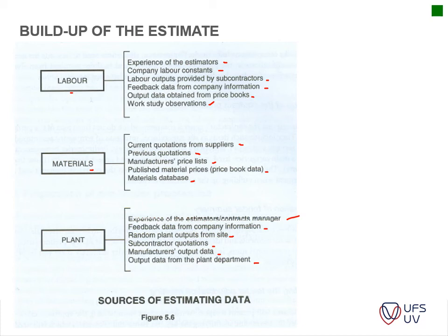So on this project it will maybe be needed for an hour. It has a cost of 6,000 Rand per day, depending on the size of the excavator, and then you can calculate, okay, this will be the cost of excavating this section. Obviously you will need to take into account that you might need some labor to clear out the excavations, and cleaning and leveling them. Is that excavated material staying on site? Is it stockpiled? Is it carted away? That type of thing has to be taken into account.